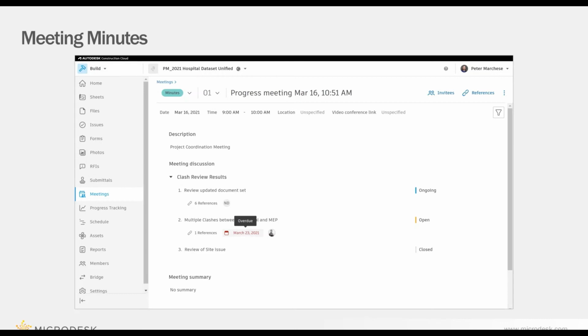And I can easily take what we have from this meeting and copy it forward. Meaning that once we're finished here, I say, well, we have our weekly meeting. Every Wednesday we go through and look at all of our clashes. Anything that's still open or ongoing will automatically get copied forward. So I don't have to worry about, okay, what did we miss? Did we cover everything from last week that was still open? We're not looking in 15 places for this. We're not checking emails for all of this. Again, we have our one location and it has everything that we need inside of there.